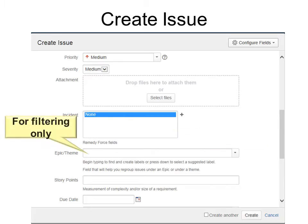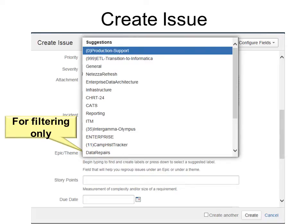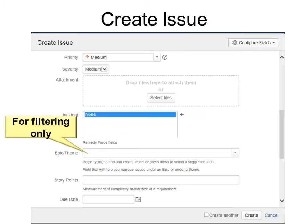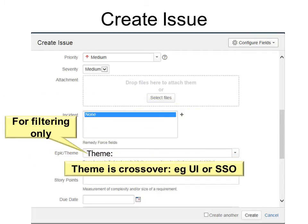Now the epic theme, epic slash theme, is strictly for filtering. It is not linked to anything else. You'll find that later. So if you're going to tie it to an epic, if you want to have it filter on an epic, you can choose the epic that you want. But if you're going to tie it to a theme, there's nothing that shows the difference between an epic and a theme. So be sure to put in theme colon first for a theme.